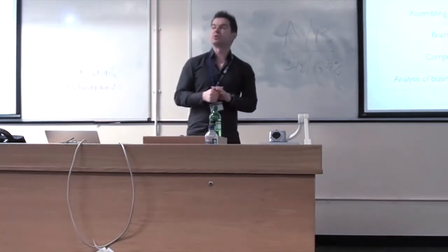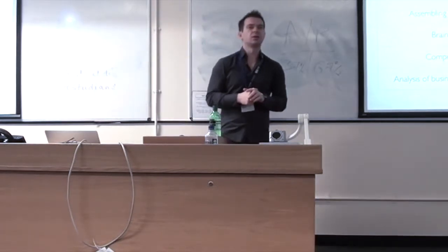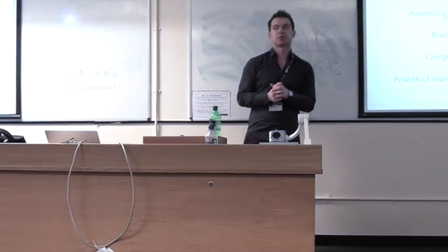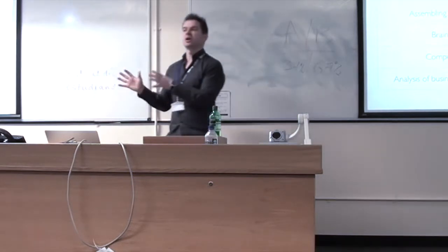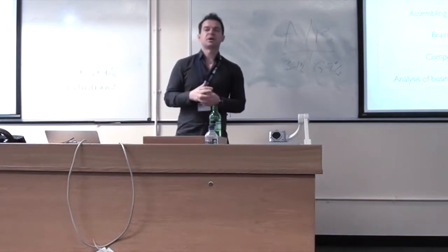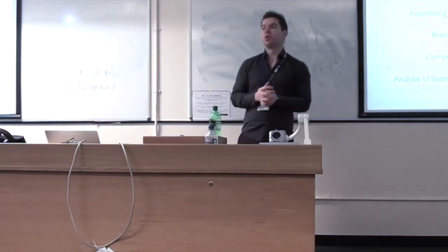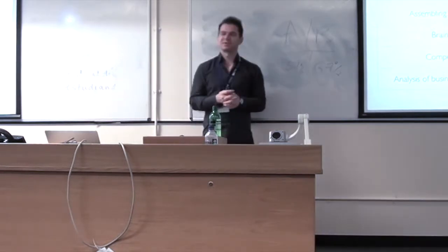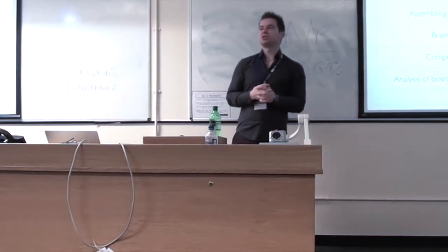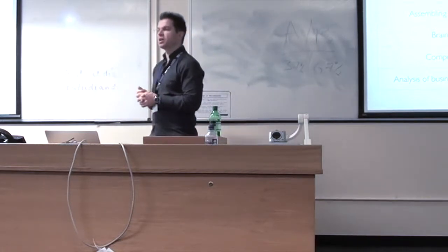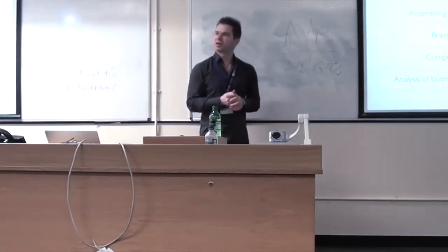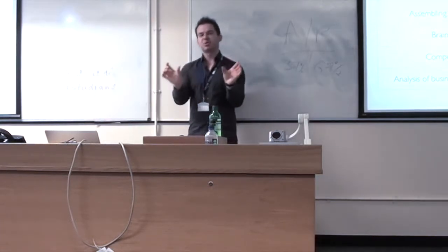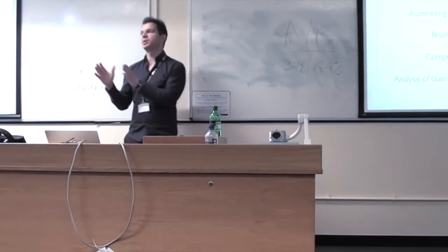Okay? And one important element in this one here, which is very practical, is the fact that every time you agree on something, you've got to have a sign-off from the people you're working with. Or if you're working with a customer, with a client, right? Because the client changes their mind all the time. One day, they're in a good mood and they'll be happy with everything you tell them. Okay? Another day, they're just not feeling very good because the business is not going very well, and they will start to complain about everything from day one, work that you've done. So it's really important to have a sign-off process in every meeting, and then that is followed by different milestones as well.